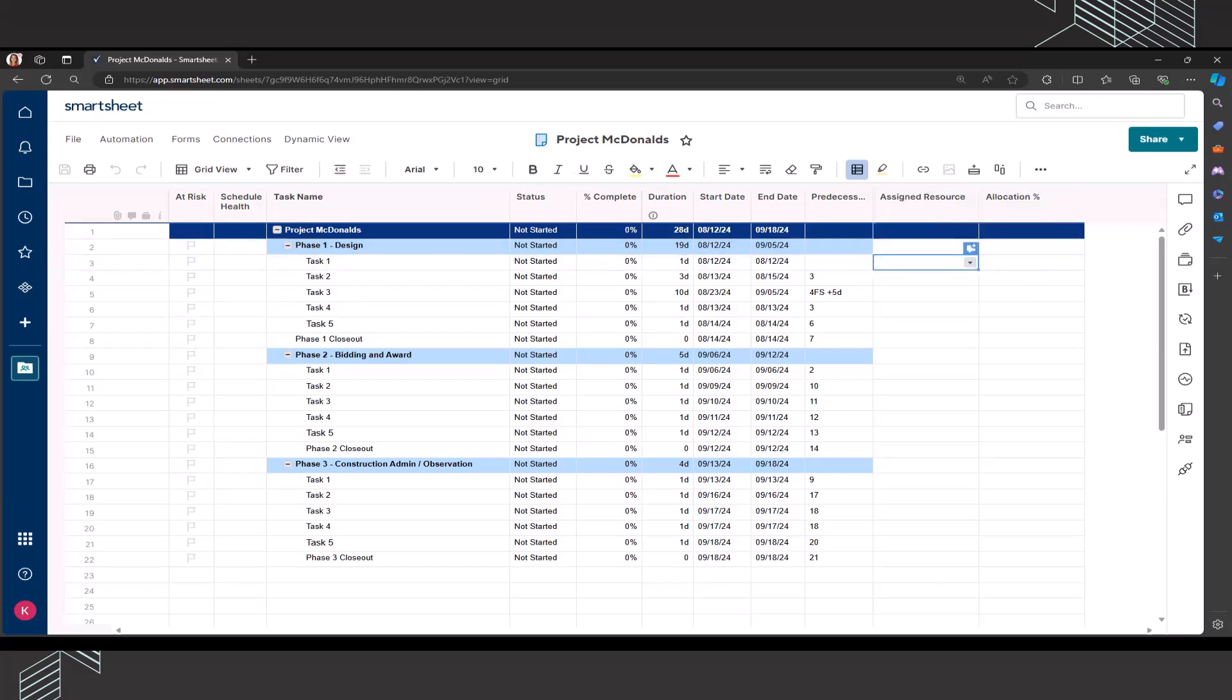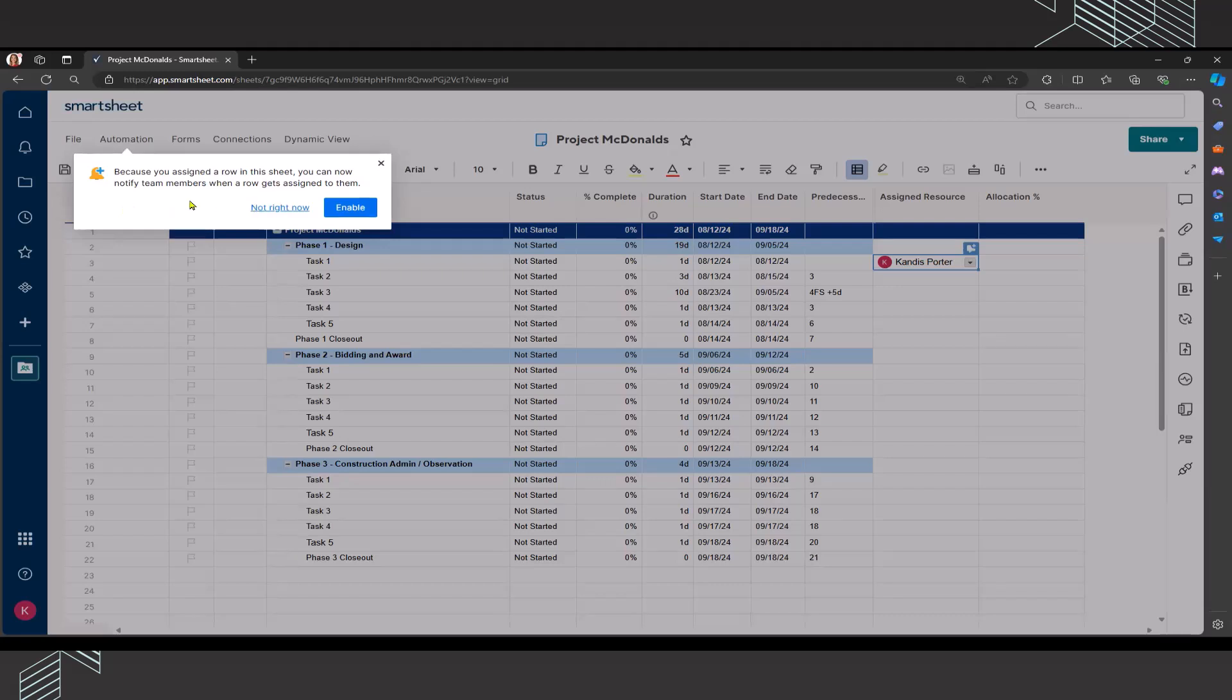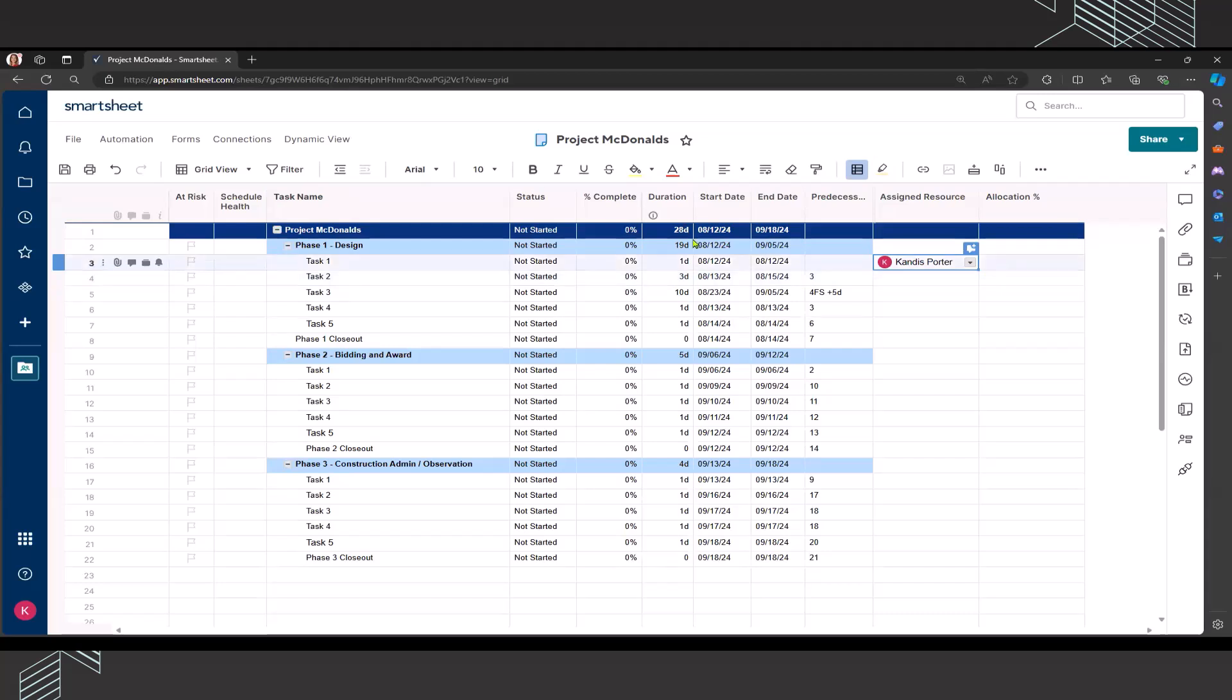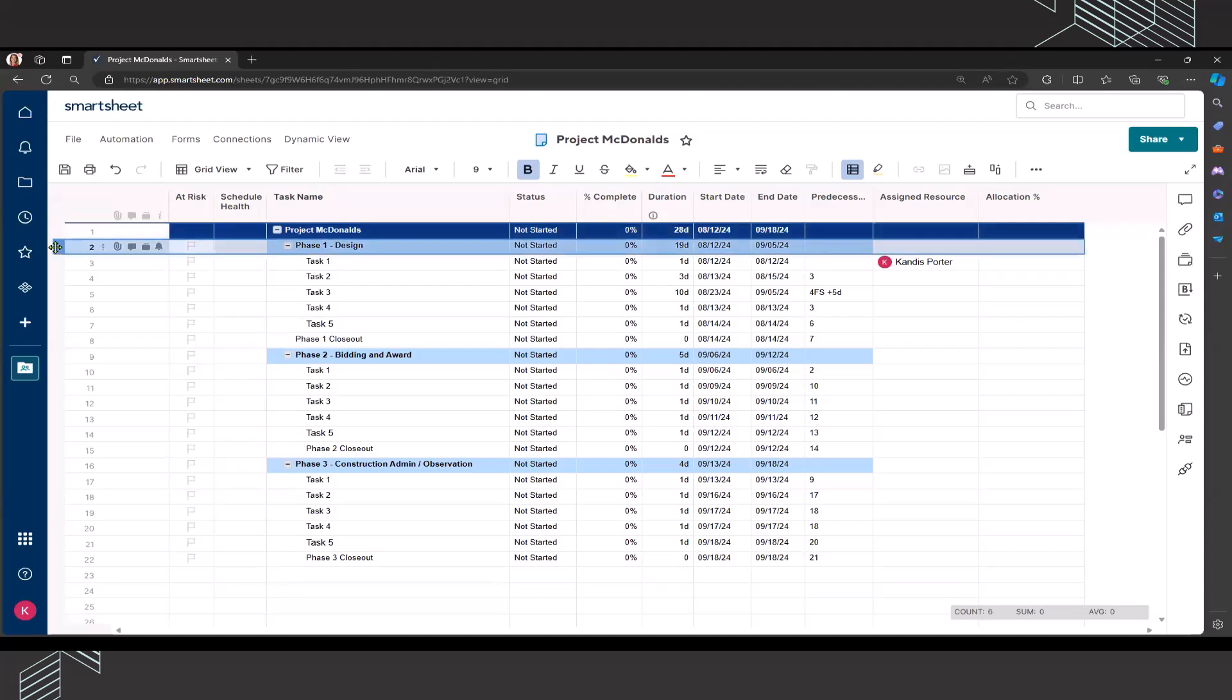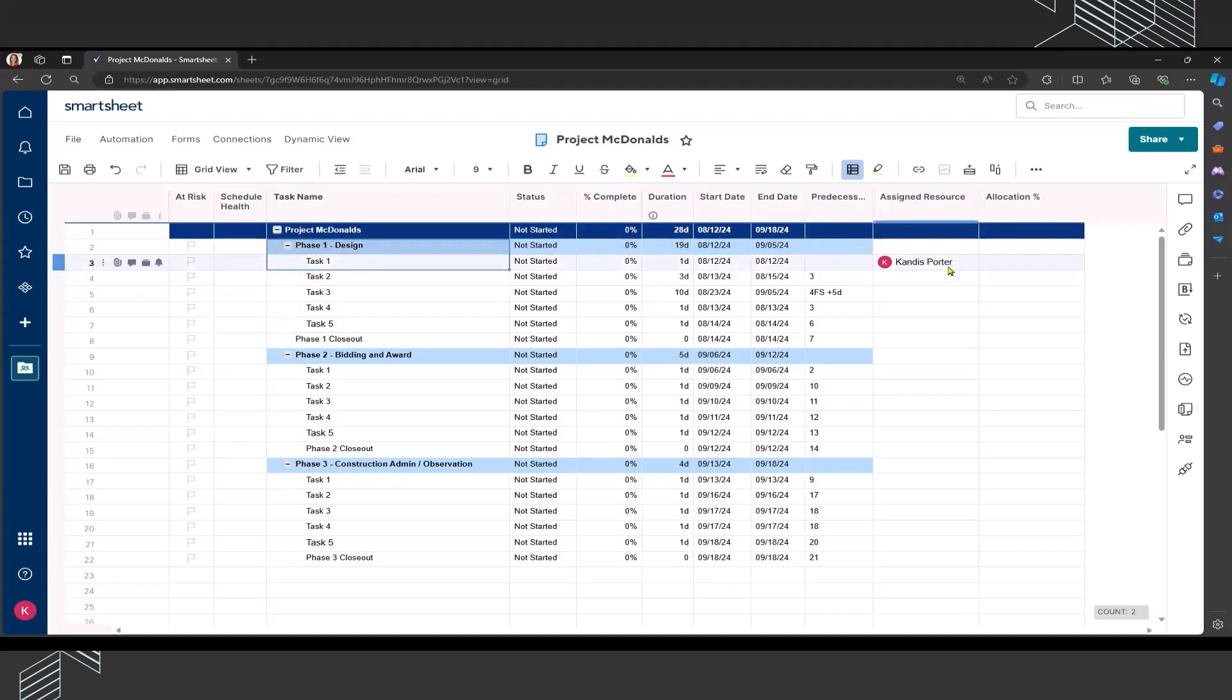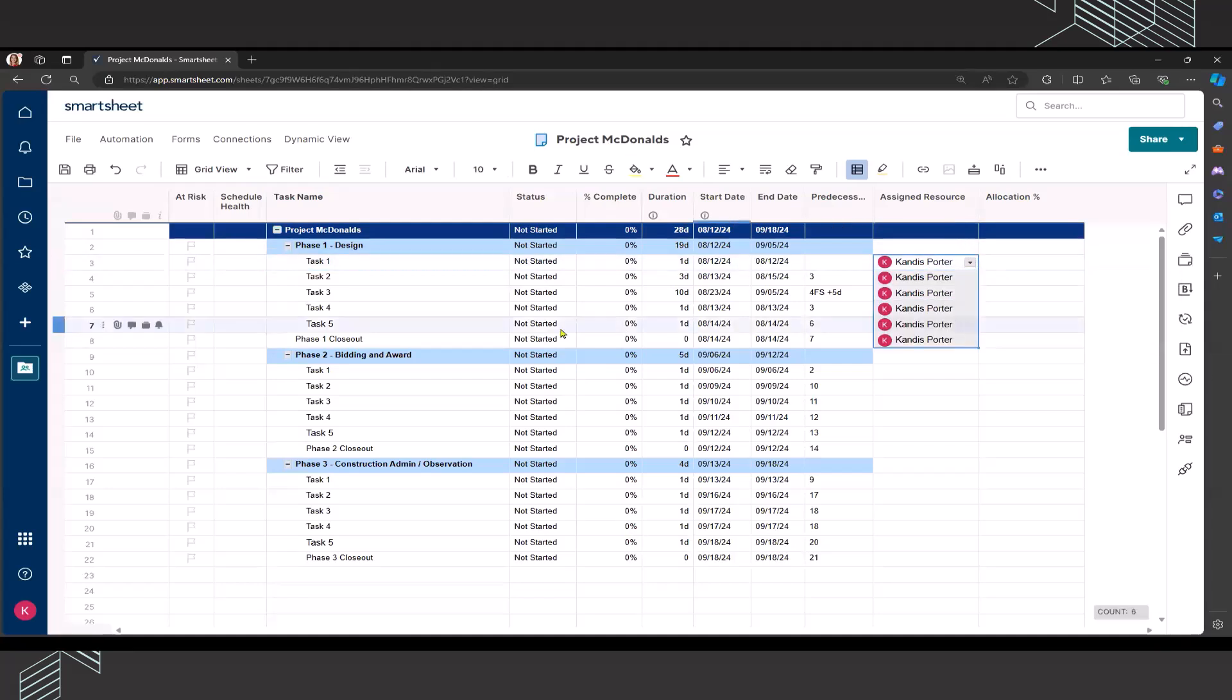I'm going to add my name to every single one of these. Once I add it the first time, it's going to let me know that I can notify team members when a row gets assigned to them. I'm going to click not right now. And remember that we assign tasks at the lowest level of our work breakdown structure. I'm not going to be assigning any work for the project level or the phase level, and it's a summary of all of the tasks that roll up below it. So I'm only going to be assigning resources at the lowest level, which means I will have them assigned to all of the white tasks.